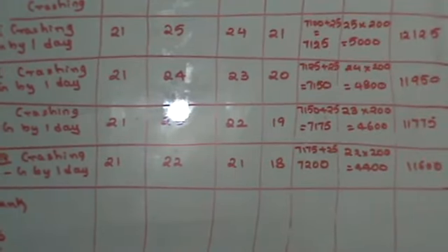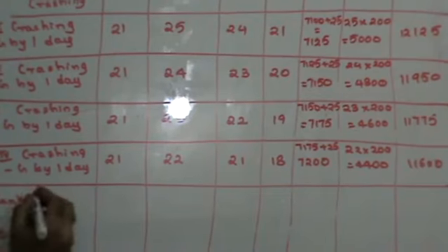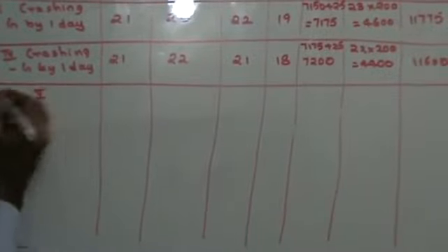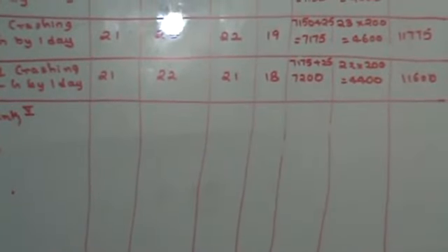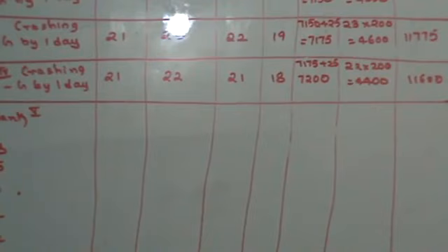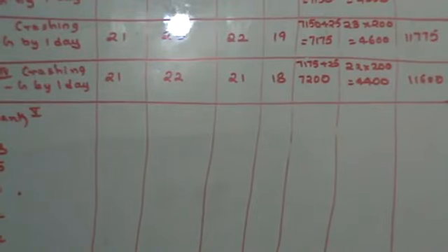The next thing that I have to crash: see, A, D, F, G, out of which G is done. A, D and F. A has rank 3, D has rank 2. So the next I'm going to crash is D. You have to go on crashing till you finish crashing all those activities that were there in the critical path.